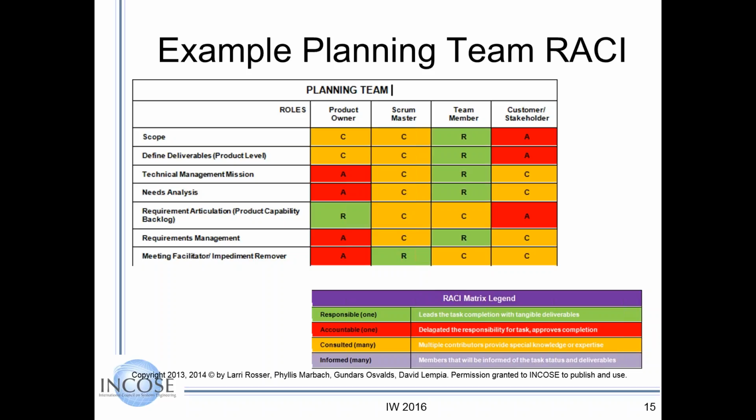So on constant, one of the radios late, because we were working iteratively, allowed us to do that. So we started all of our software a year before it was needed. So when we got into formal qualification, we finished a day early.